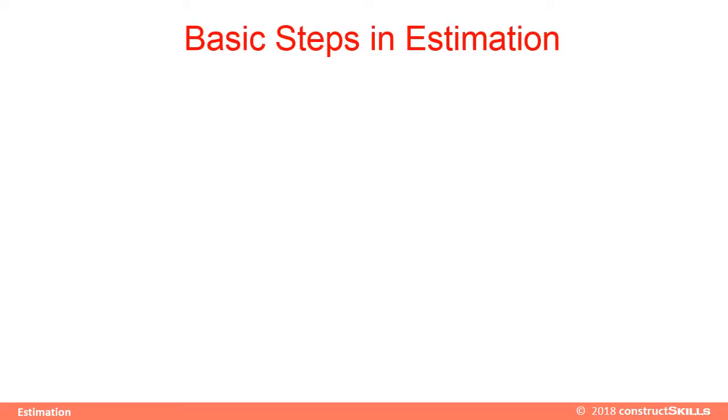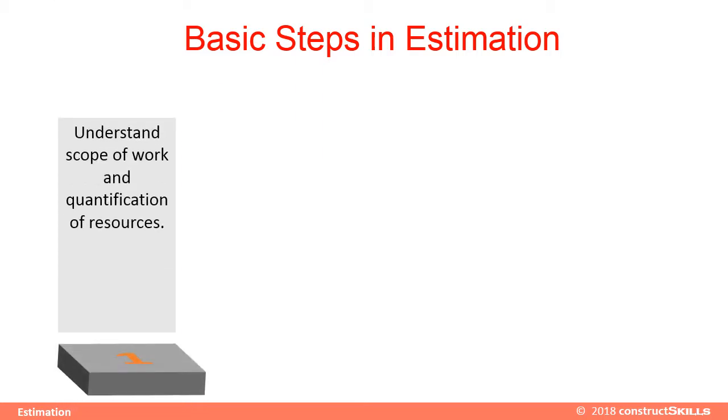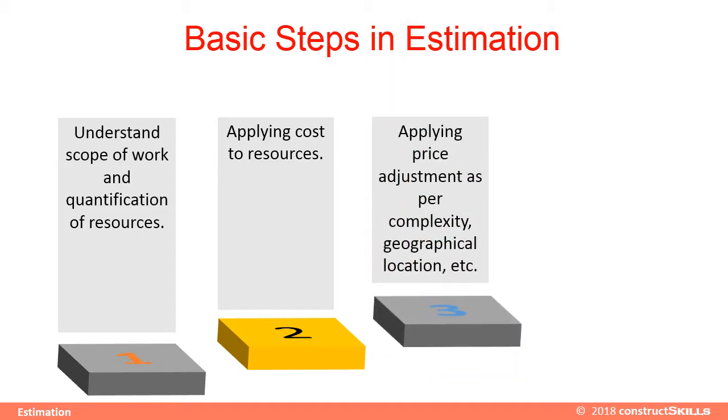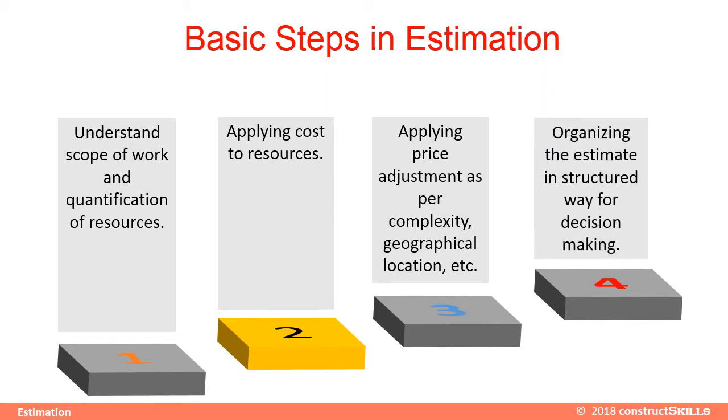The basic estimating steps are: Step 1. Understanding scope of work and quantification of resources. Step 2. Applying cost to resources. Step 3. Applying price adjustments as per complexity, geographical location, etc. And Step 4. Organizing the estimate in a structured way for decision making.